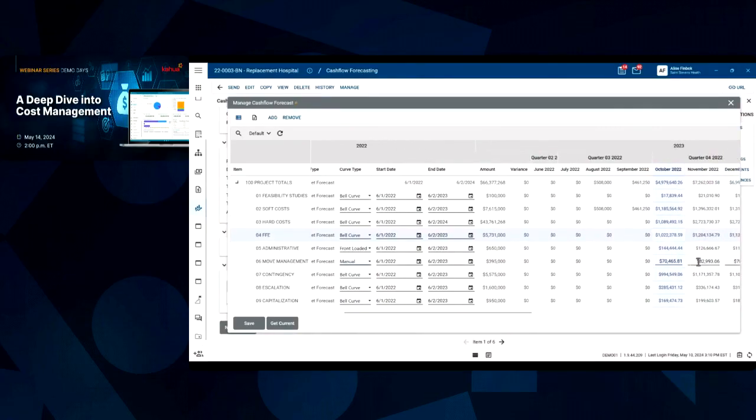So I can come in here and tweak these numbers, and then it will show a variance, and based on my organizational requirements around variances, I can either clear the variance or leave it, depending on the way you forecast. So it's very easy to come in here and forecast. Again, these amounts come from the budget and the cost system. It's automatically merged and respread based on actuals, doing all those calculations for you. You just come in, check the amounts, and make some adjustments to the spread.